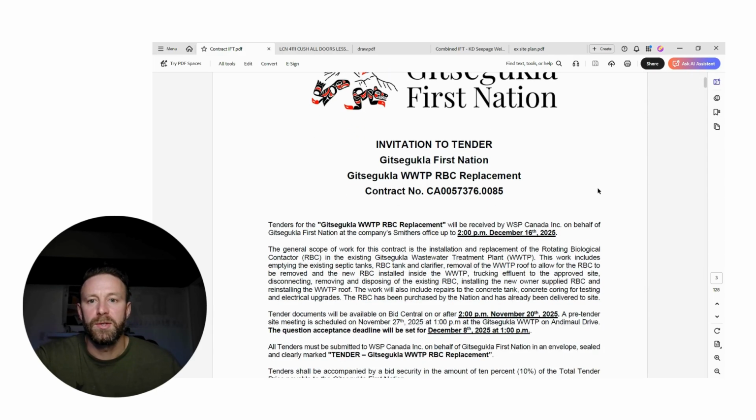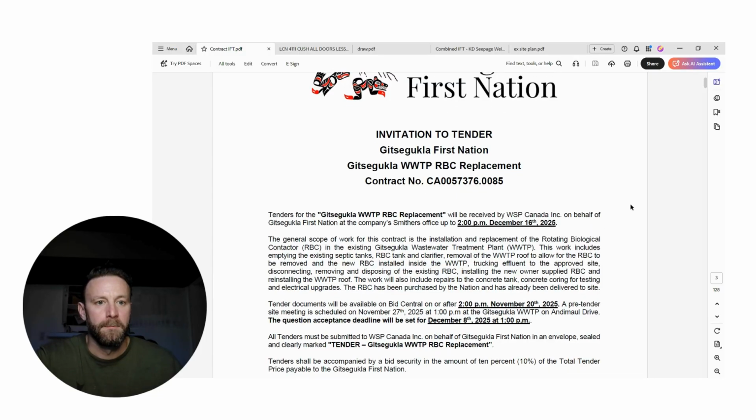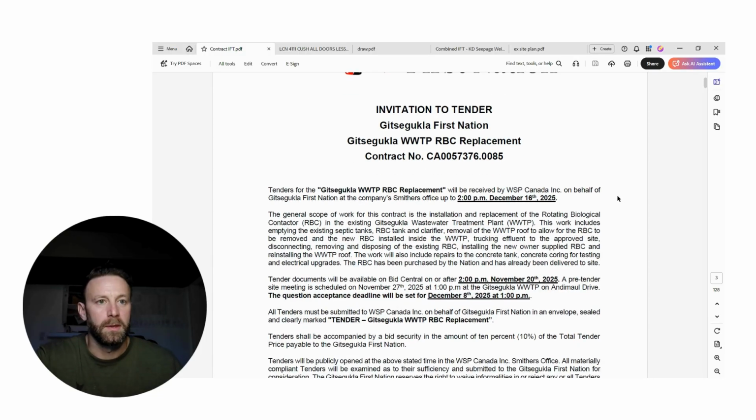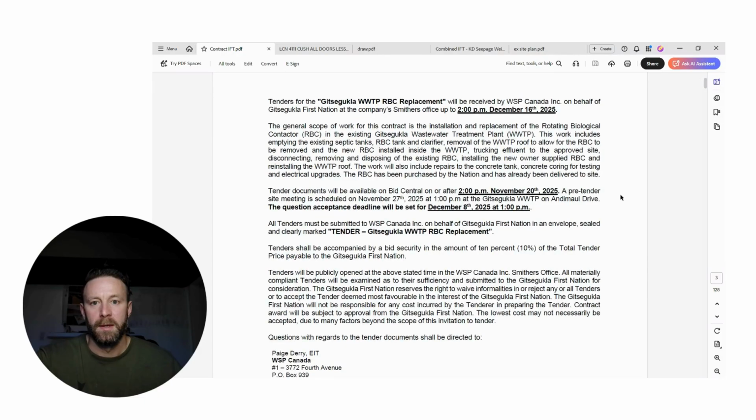So we have the invitation to tender. It's December 3rd today. It closes on December 16th. It's a weird closing time, right before Christmas. If you want to look at the important dates, you'll want to note those. What do we have here? Question acceptance deadline, December 8th. That's another important date to note. So you make sure all your questions are in before that date. Otherwise, they won't get answered.